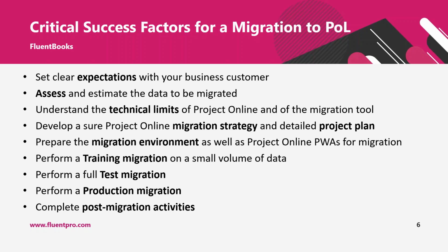After training, we advise to perform a full test migration. And the reason behind that advice is that there are data-specific issues that can be encountered during the migration, and it is always better to catch them and mitigate while you are doing test migration, while users are not affected.